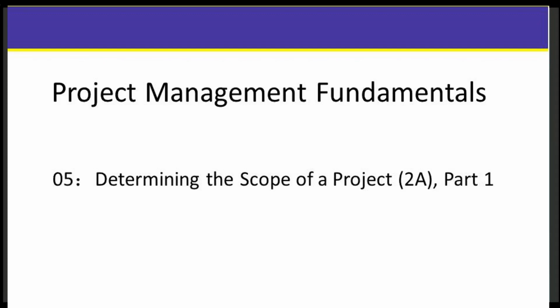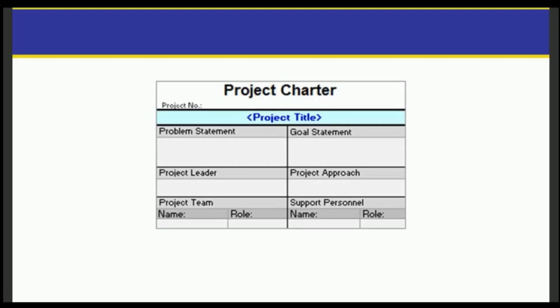Okay. Not the project manager, which sometimes doesn't happen in the real world. It's issued by the sponsor that says, hey, you're the project manager, these are the parameters you have to work in, and this is the output that I want. So typically there's some attributes in there such as time constraints, budget constraints, resource constraints. Those are usually articulated in a charter. So the charter is kind of the big picture of the project? That's right. It's the big picture of the project. It's the starting point, right?